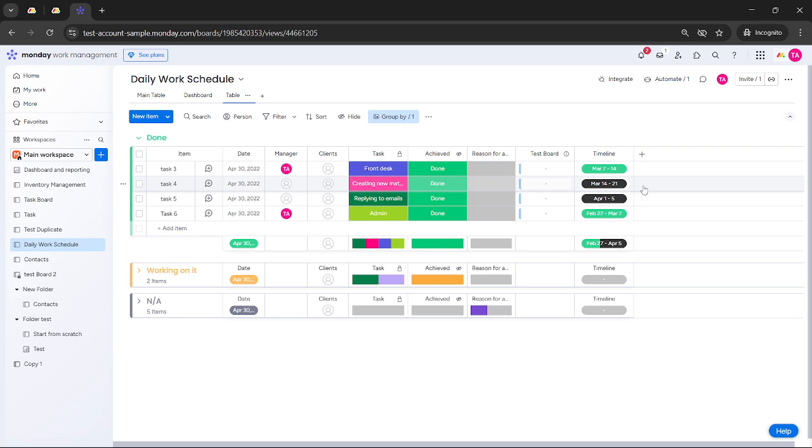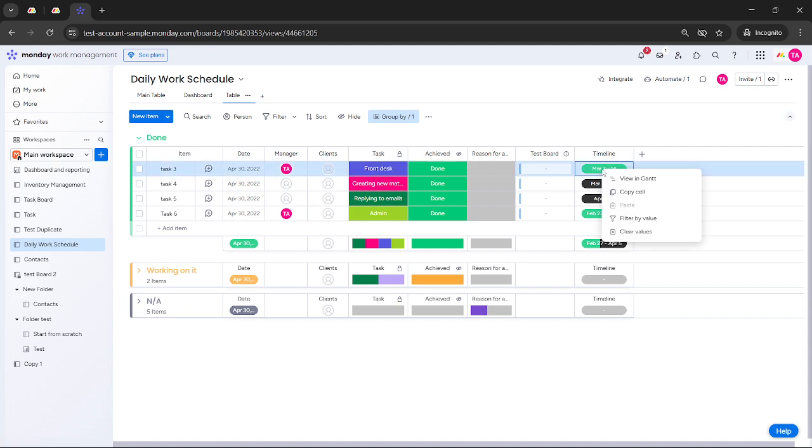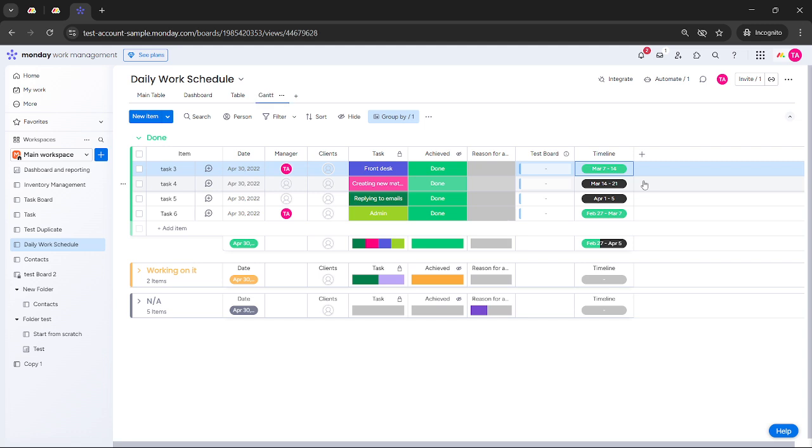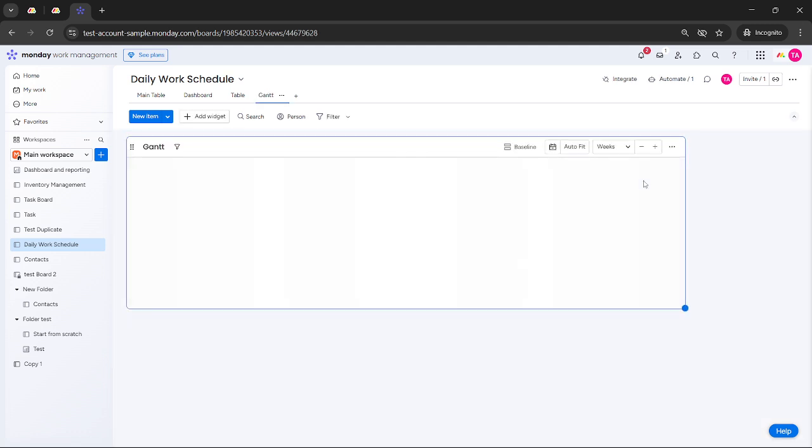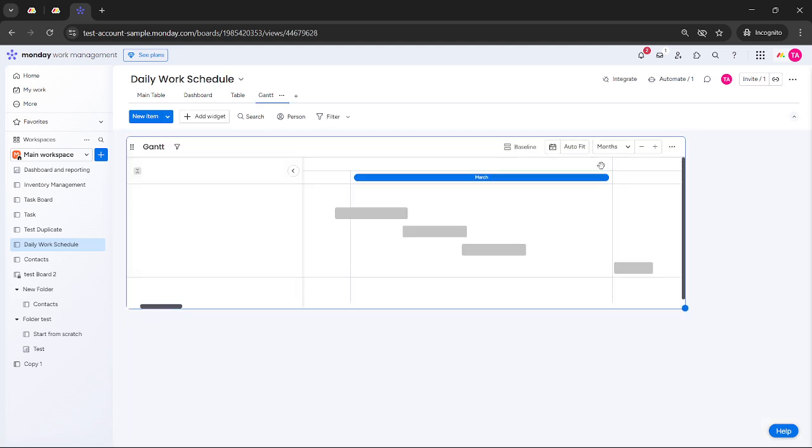After confirming your view, focus on the timeline column. To add a milestone, right-click on the designated date within this column. From there, you'll want to click on Viewing Gantt, which opens a new tab displaying your project in the Gantt view. Gantt charts are especially useful for tracking project milestones because they provide a visual layout of the entire project schedule, helping you see overlaps and dependencies.